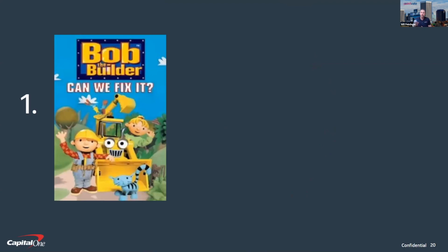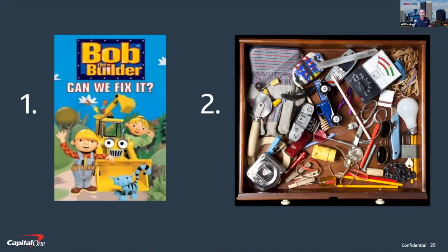And so the first problem, and this doesn't happen in practice a lot, could be, well, we've got this work, but it doesn't tie to an epic that already exists. So are we allowed to do it? But usually people quickly get over that fear, and they say, well, let's go ahead, we'll create a new epic to be a container object for this work that we're going to do. But that leads to our second potential problem, the junk drawer problem. So we create a bunch of epics, but there's a whole bunch of clutter on our portfolio Kanban.